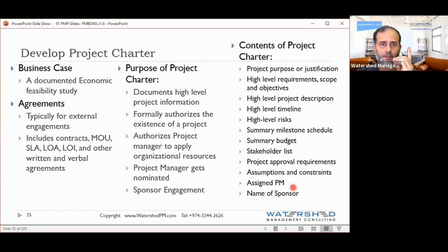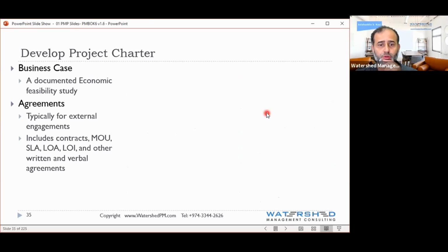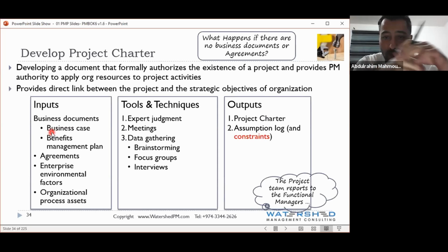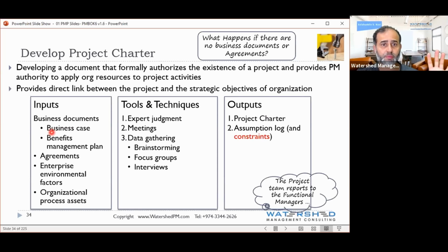Don't you think the business guys already had all similar questions, if not all, similar questions answered in your business case? Yes. They would have put in the business case the objective of the project. They would have put in the business case the money they want, the time they will take. Correct? Yes. So if you are the project manager now, make your life easy, find the business case.